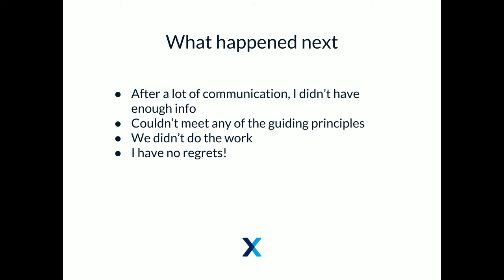So what ended up happening with this was we communicated back and forth a lot, and I really tried so hard to get the information because I knew they really wanted it, but in the end I just said, look, I can't estimate this for you. Come back to me when you've got some more details. You'll need to know the details anyway if we're going to implement it. So I'm not going to give you this open-ended estimate that could totally blow up in our faces.